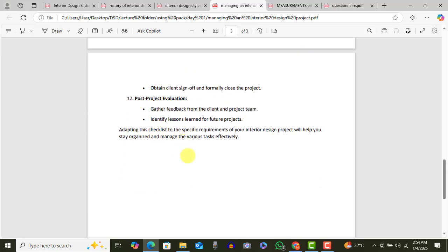Then this one that I added here is basically for your business growth. Post-project evaluation. Every project you do, an evaluation. Did we miss our timelines? What didn't go well? What did the client complain about? What happened? What were we able to do well? It's just to improve you. So next project you do, you won't repeat those same mistakes. Every mistake you made, you correct it. Right? So you always do a post-project evaluation.